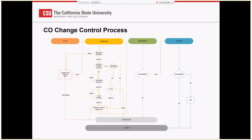Once we get a cab approved, we move on to what we call the change control approved. That means everybody involved with the CR that has a task, the submitter, the person that's assigned to, will get an email. This change request has been change control approved, please proceed forward.